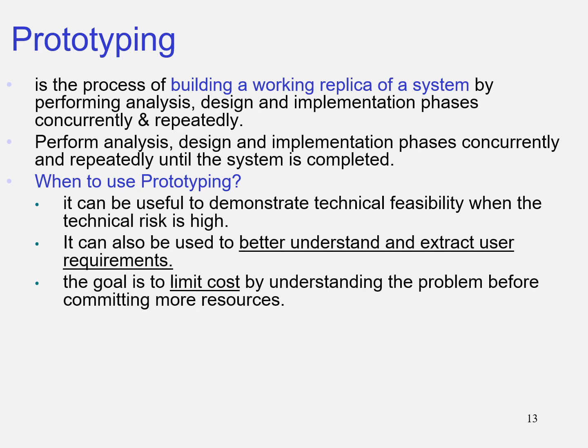So in that case, they start to come up with a prototype. Why? Because they can show it earlier to the user and get the user's feedback on whether this is what they want. It can also be used to better understand and extract user requirements. This is what I meant just now. And the goal is to limit costs by understanding the problem before committing more resources. So you want to show the prototype to the users and get their confirmation that this is what they want.